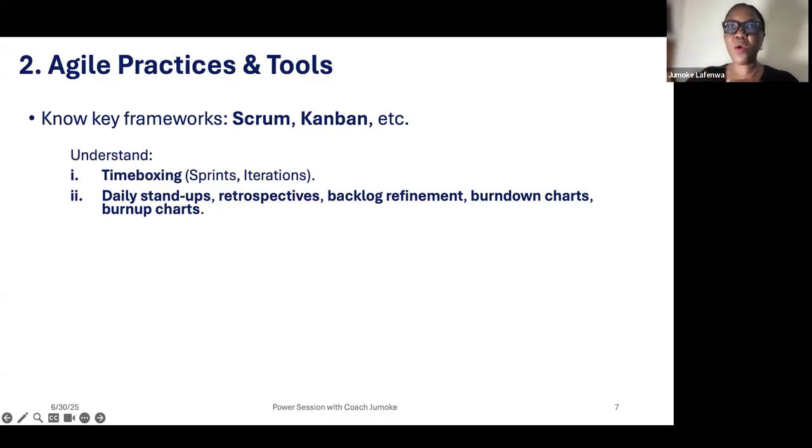Now, when all these things are broken down into user stories and features, where you itemize those things is called the product backlog. So when it is listed, the product owner works with the user, the customer, to prioritize them. So, customer, you have listed 70 things. Let's order them in order of priority to you. So it means the topmost one is the one that is of utmost value to me, and I want you to start work on that. So this prioritization of the product backlog is the refinement.